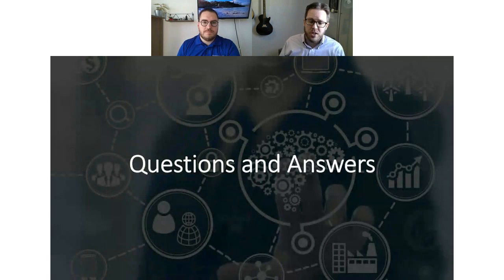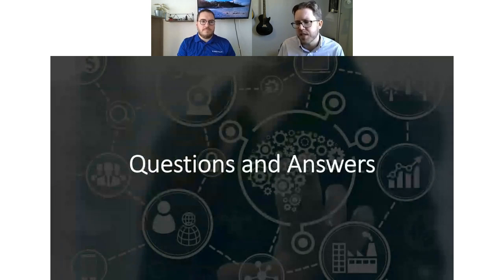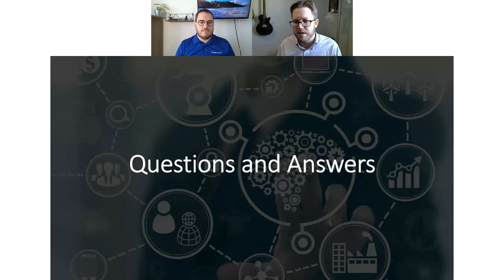I would argue that it's actually really not dissimilar from the way that you would quote any other project as a systems integrator. It's just maybe a little bit more transparent, and there's a little bit more risk and collaboration that everyone is accepting as you go through the process. So whether you're asking for a fixed price quote or a time and materials quote, there is usually some math going on in the background to think about what types of people you have and how they're going to be able to contribute and how much effort it's going to take them to get certain tasks done. We're just exposing that for each of the user stories that we're developing. And we're usually acknowledging that we're going to be developing that proposal content and the pricing estimates over time.